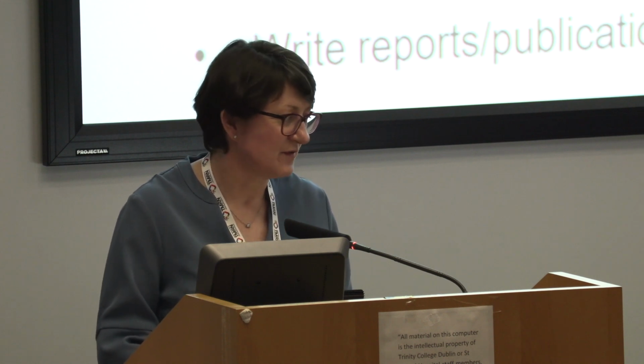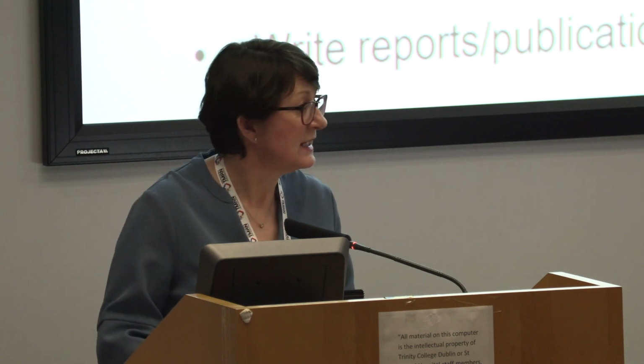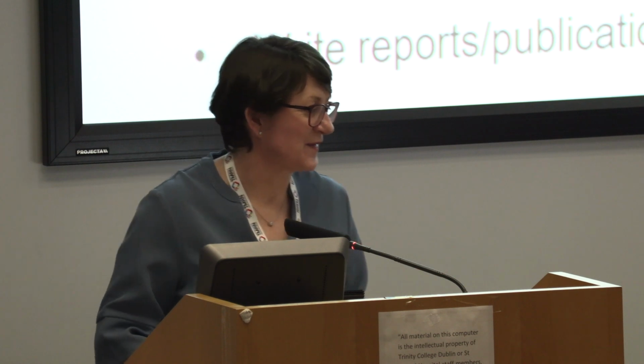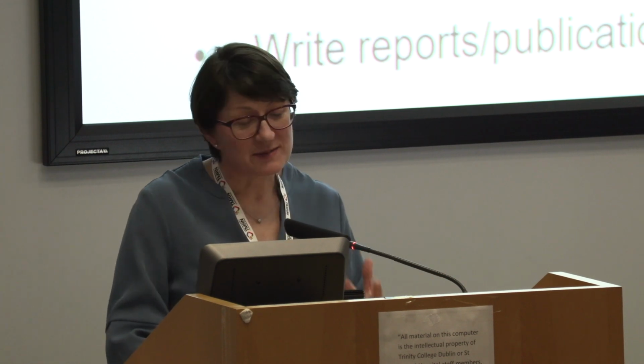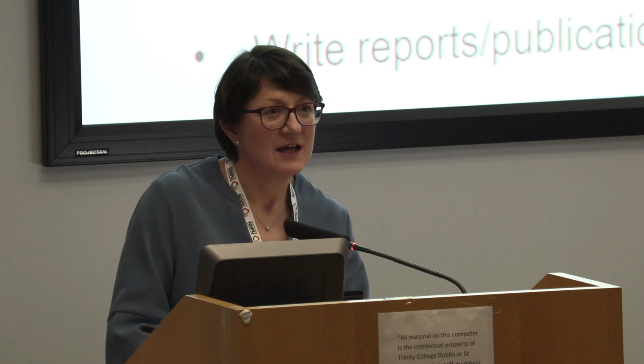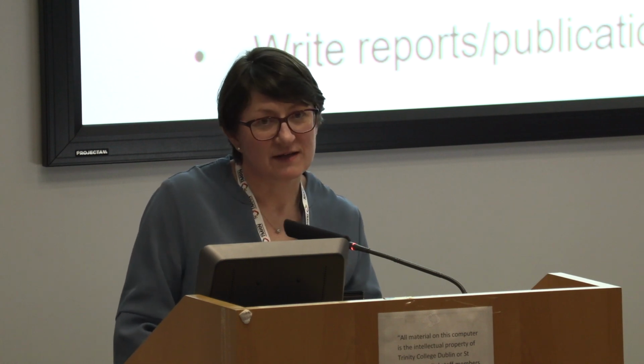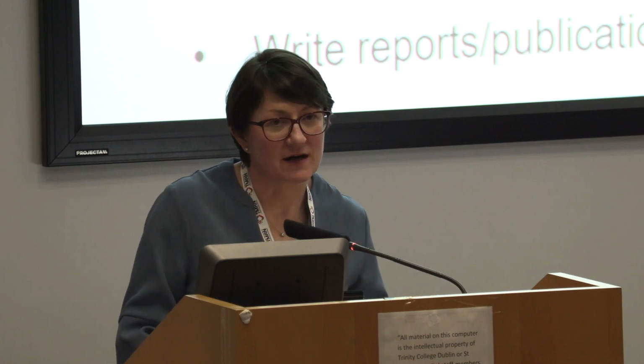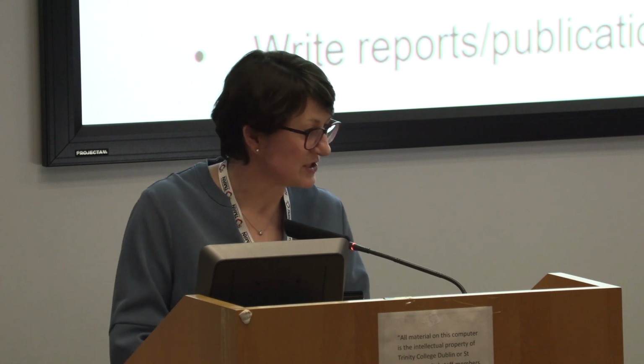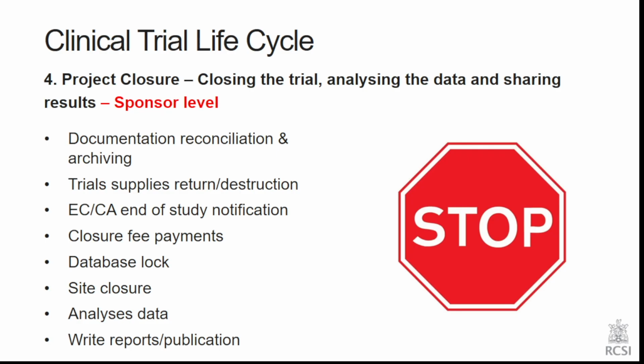And again, there's 2 very long lists here. Well, actually just one, thankfully. And I think I have it for both the sponsor and the site as well. But documentation, reconciliation and archiving. Again, there's so much archiving now that needs to be done. The trial master file needs to be archived for 25 years with the new regulations. So there's a huge amount of work that needs to be done there. And again, you have to have a suitable vendor for archiving that will take it off site if that's what your preference is. You need to make sure that you're taking the supplies back from site, that you're just destroying them if they're not going to be reused for something else.